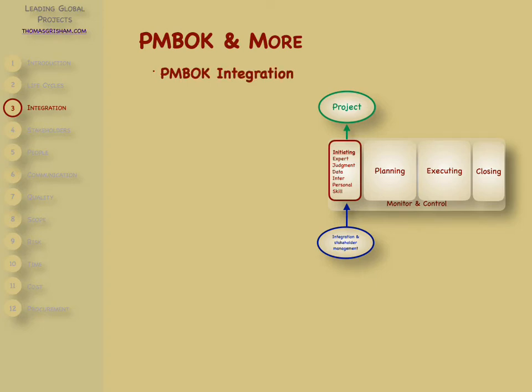So for the PMBOK integration, the result is a project charter. That shows the little green bubble up above. That's when a project actually becomes a project. There's money associated with it. There's a budget associated with it. The organization is expecting to assign resources to it.